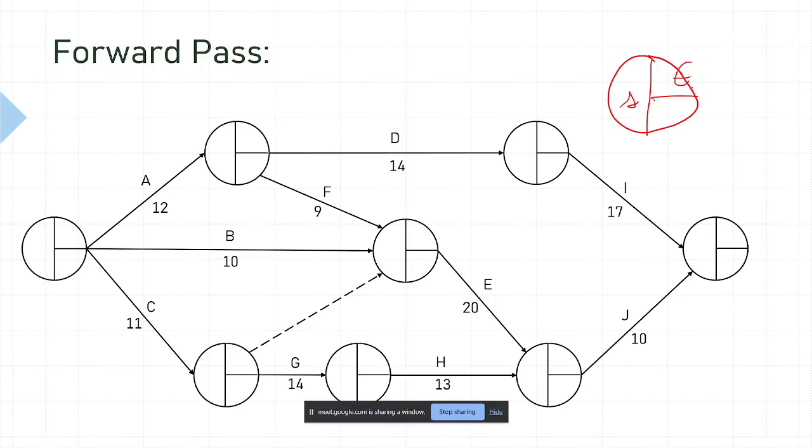Duration of the activity, sir, we put it on the activity arrow itself, below the activity name. That's already there. So these three, from the clockwise direction, from left to right, are for slack, earliest event time, and latest event time. I will write EET and LET. Is it clear to everyone? Yes, sir. Okay. So help me fill this for each and every event. We'll do it.